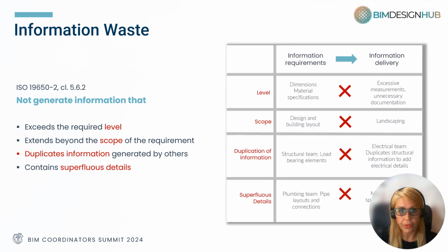If the required information for a specific element is limited to its dimensions and material specifications, do not provide additional details, such as excessive measurements or unnecessary documentation, because that would be considered exceeding the required level. If the required information during the planning phase is relative only to the design and layout of the building, do not include details about landscaping.